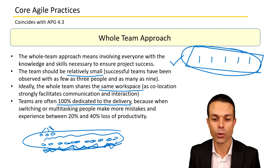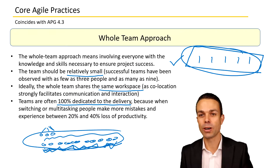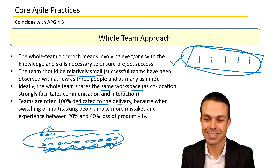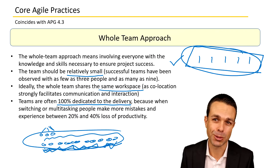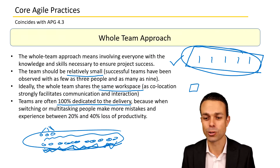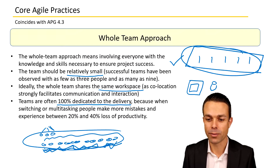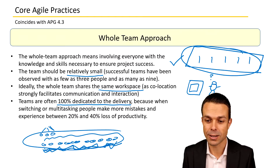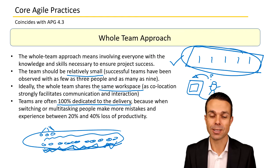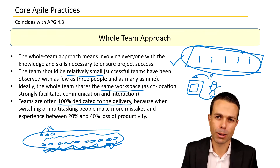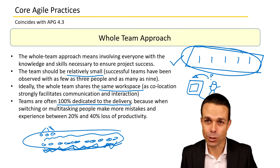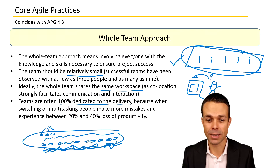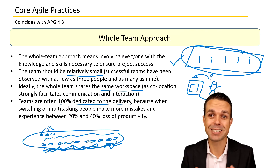Teams are often 100% dedicated to the delivery as well. It's been shown that when you're switching tasks or multitasking, people actually make more mistakes. Studies have proven that people lose productivity of between 20 and 40%. If you're working really hard concentrating on something and someone comes over and asks a complex question, you have to answer it and then go back to the task, winding up again, remembering where you were. George RR Martin famously rereads his entire manuscript before he starts writing again just to get completely up to speed. The loss of productivity is huge.